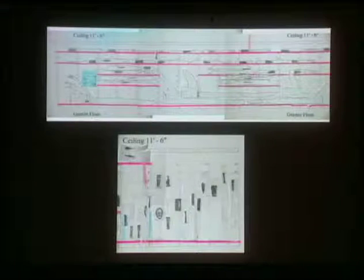As with all other phases of the construction project, subcontractors were scheduled to install the shelving within a narrow window of time. Calling them back to make shelving adjustments would add unnecessary cost to our budget. We had to be sure that the spacing between the shelves was adjusted to accommodate all the objects, and in our space there was no extra room for miscalculations. One very low-tech way to accomplish this task was to make scale elevations.